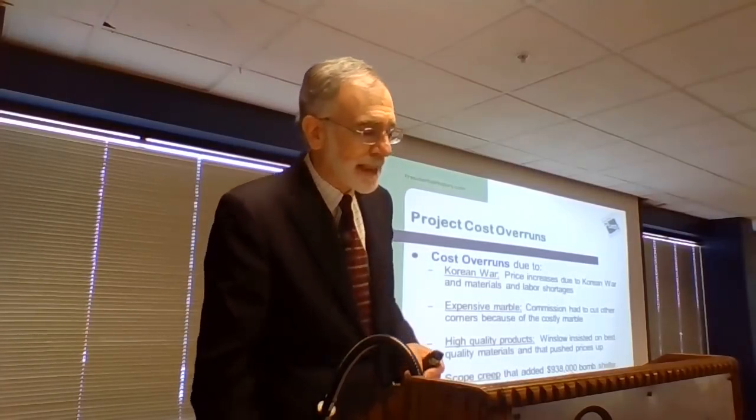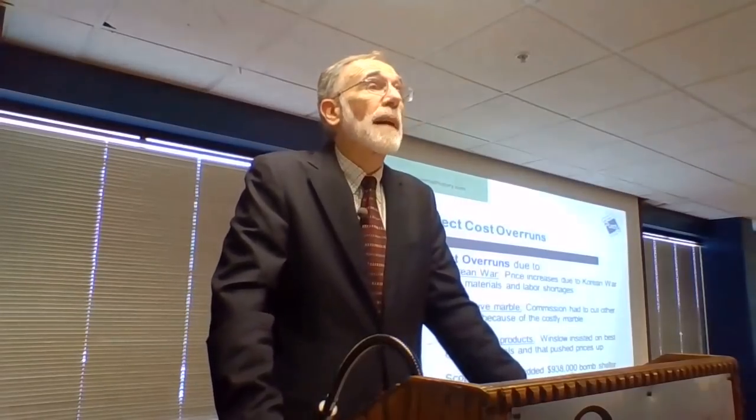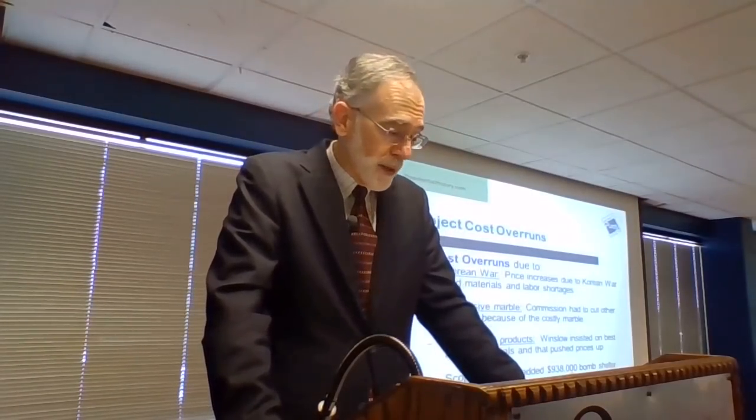The White House architect insisted on the best quality of materials. That jacked up some prices as well. They had a small $1 million change order to add a bomb shelter. That jacked up the cost as well, and work stopped while they finalized the plans for that.